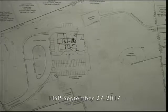If the DPW can do it, I don't know how bad it looks now. I think Tony might have something to say. At this early schematic level, until we start really seeing a full detailed estimate on what it costs, I wouldn't vote for something in or out. Understand that it is a cost, but when you see a fully broken down estimate of paved areas, parking areas, we can break that out in an estimate, and then you can decide from there. I don't think that needs to be decided tonight. It could be a prospective alternate until we have better budget numbers. Yeah, better cost numbers.